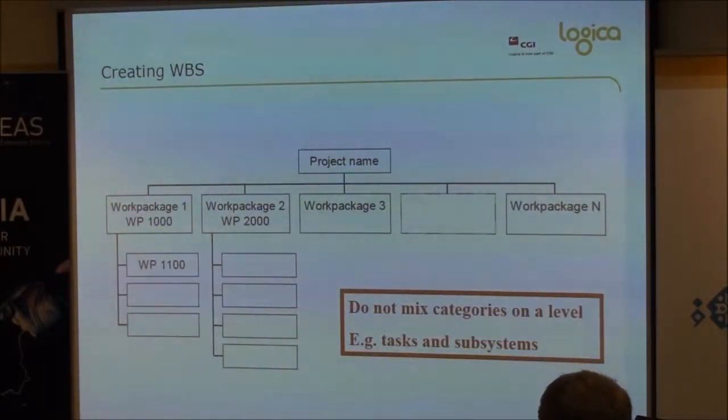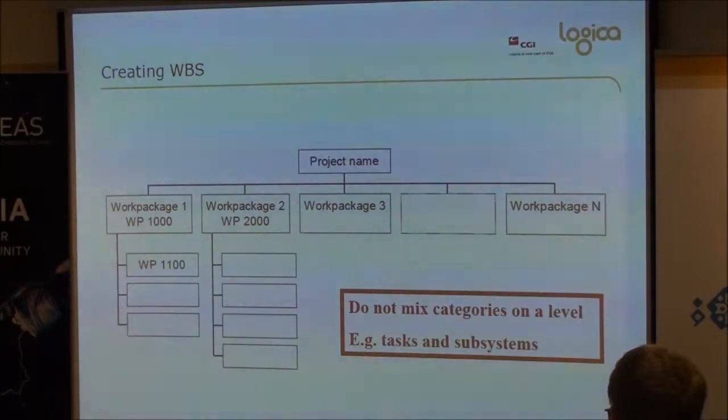Okay, so I don't know how many of you are aware of WBS and how this forms, so I thought it was worthwhile just to put a bit of a diagram up here. So what you should have is, quite often actually, they will break down into work packages and work package numbers themselves. You'll see this in the ITT. You can further break down that any which way you want. Yeah? You can add work packages if you want, if it makes sense.